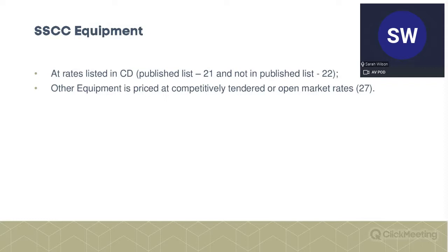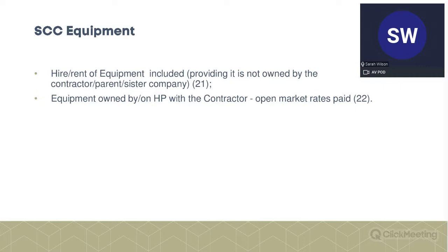Of course, all of this is just about recovering the cost of the equipment, in the same way it's just recovering the cost of the people for the people section, because once you've calculated that, you would then apply the fee percentage, which deals with your overhead, profit and those other miscellaneous items.